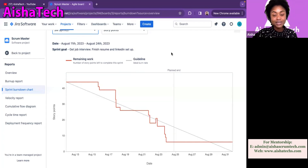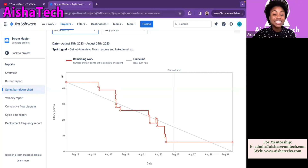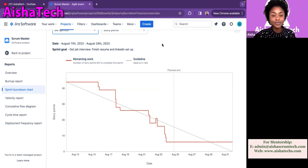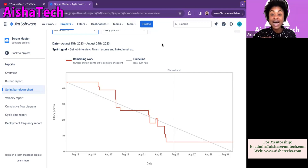Now let's interpret another example. When they give you another burn-down chart, always go back and do the same thing. First, look at the sprint length at the top. Look at the sprint goal. Determine what type of estimation this team is using. Understand the length of the sprint. Then give your scenario. Looking at this burn-down chart, this team had the sprint between August 11 to August 24 — a two-week sprint.